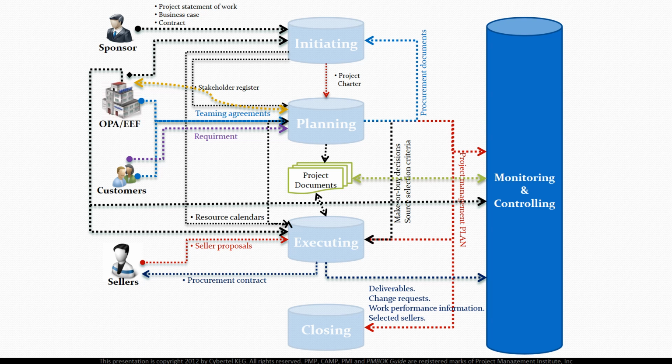The effort in this process group is done by controlling changes, including corrective or preventive actions against issues that may occur during the project, and also by monitoring the ongoing project activities against the project management plan and the agreed baselines, by allowing only the necessary and approved changes. Monitoring and controlling the project gives the project team a whole vision about the project performance status to take actions where actions are needed.